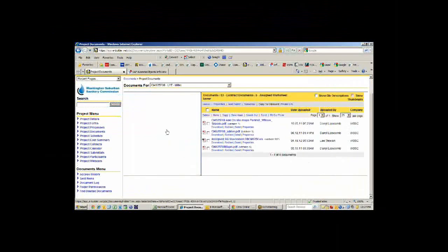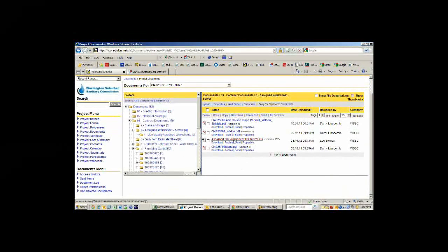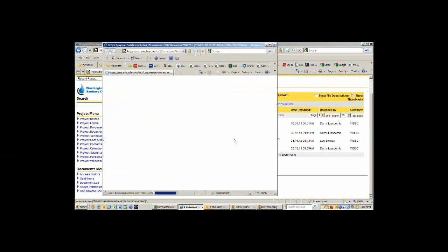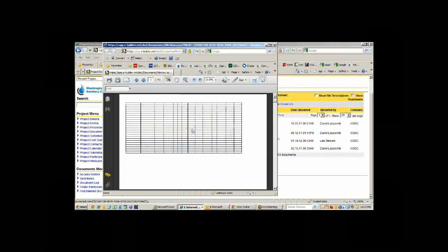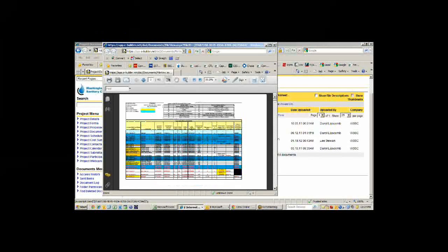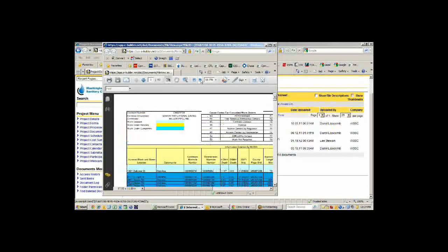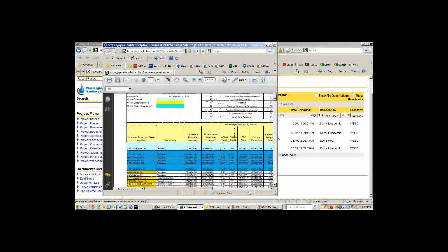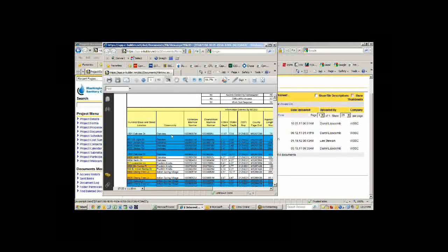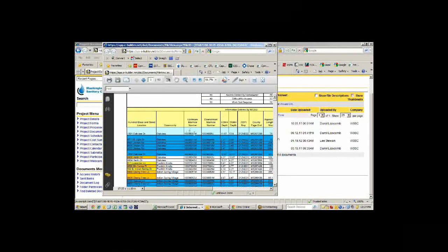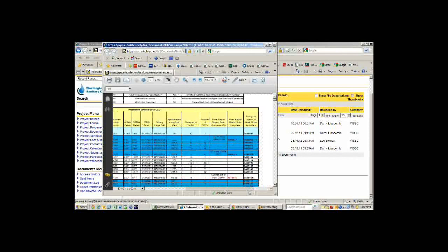We also have what's called an assigned worksheet, where this is actually the work that's going to be done on this particular project. We can pull that up and zoom in on it. We can see at every address, here's the manhole information, the length, et cetera. We've got the map and grid page, the diameter of the main.